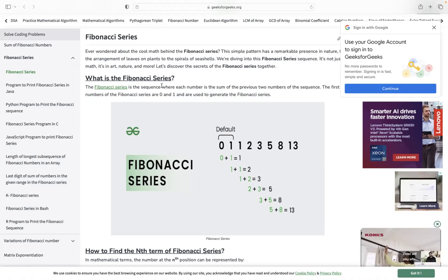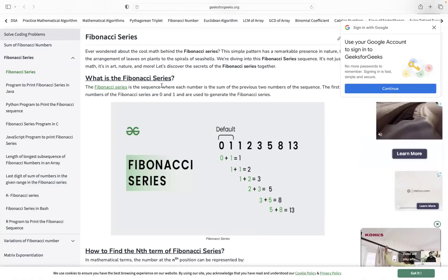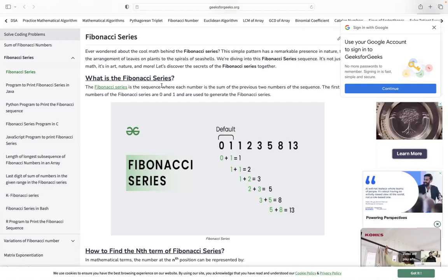Typically, it depends on the organization. Some use zeros, some start with 1, but 0 or 1, 2, 3, 5, 8, and 13. If you have something that's an 8, in the organizations I've worked in, typically you want to try and break it down. If you can't, that is typically the largest story that you will have in a sprint. If something is estimated as a 13, in the organizations I've worked in, we've considered that too large to be in the sprint, and possibly might even look into creating an epic for that. But most estimates are within the 1, 2, 3, 5, and 8 range.